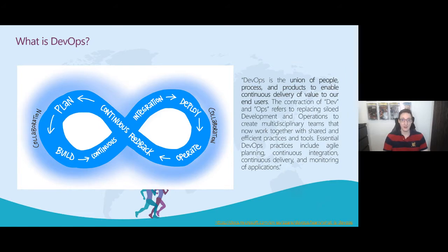Now, DevOps then obviously includes things as mentioned below here, agile planning. So you're not just planning, okay, I'm going to develop a large solution next 3 months. That's what we're going to do. And then afterwards, when we're done, we're going to plan again. But no, you basically plan continuously. You're working in certain sprints. You're working on, I don't know, developing something within the next 2 weeks. And in 2 weeks time, then you review again, okay, what are we going to do next? Not that you don't really know it, but you might have an idea, but maybe there are some shifting priorities based on some feedback you received. So you're reviewing again regularly what you are doing and what you're delivering.